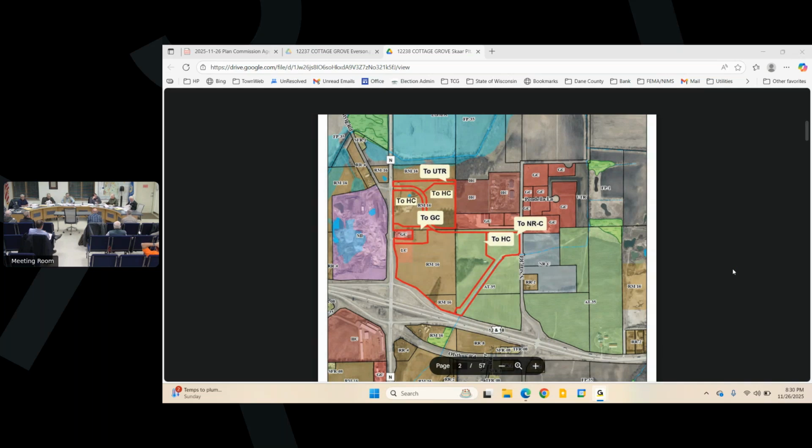And these are what are going to be in the deed, correct? Those will be recorded against the entire plat, and it will affect all the lots in the plat, so they'll all have to meet it. It'll show up in title work when somebody's looking at that. Except for lot 3. It's excluded. The legal description does not include lot 3.